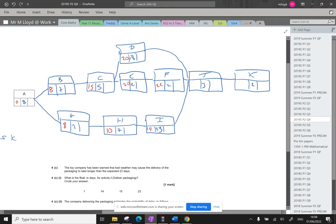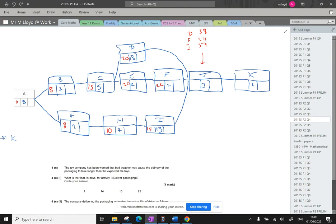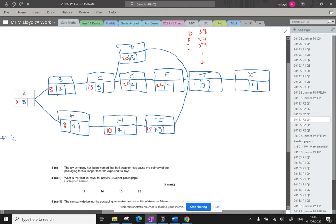C into D is going to be 20, so that can only start after 20. F, 22, and this is now where we have a conundrum. So if we follow the route of D, and I've got F and I've got I, D, 38 days until it can start. F, 24, and then I is 37. So we have to take the biggest one. We can't start J until everything's done, and D is the one that finishes last, which means that's the one that we have to wait for. So it's 38, and then moving forward, 41.